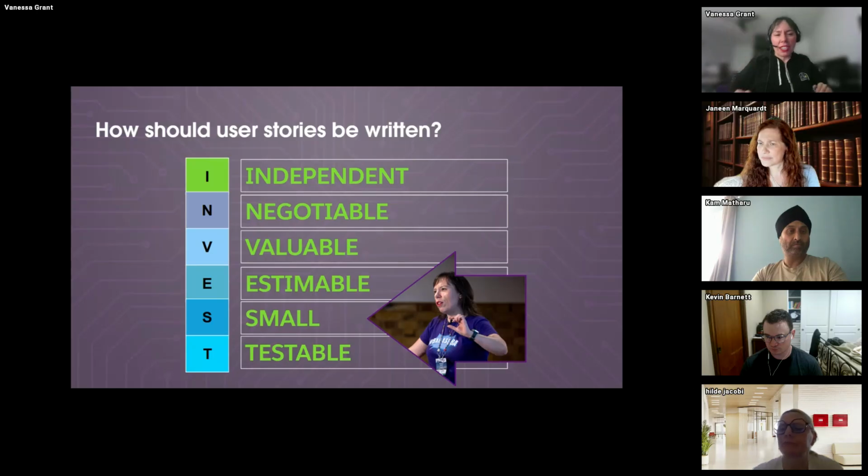I've actually even written a Salesforce Ben article on 10 questions you should ask when somebody says, can I just have a field? Because there's a lot that goes into a field. It's like, okay, well, is it a mandatory field? What should the format be? Who should be able to see it? All of these things are things that would go in the acceptance criteria.